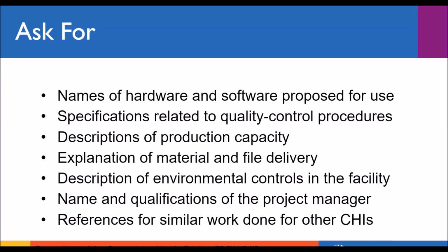You'll also want them to talk about how they're going to deliver both materials to you and files. Is it something that's going to be shipped? Are they going to pick it up and drop it off? How is that all going to work? Because there might be additional costs associated with different options. So you'll definitely want to know what is included in terms of shipping, courier services, those sorts of things.